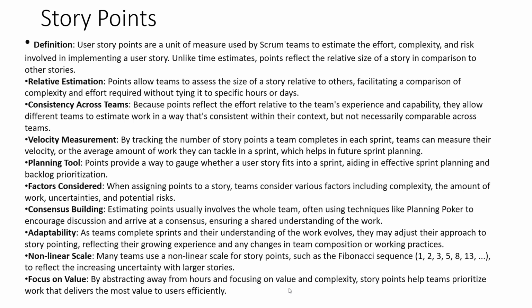And we don't want one person giving the estimates. We want the team as a whole to be able to understand what's going on and collectively give feedback on their experience and their capabilities and what they think it needs to actually get done. And when thinking about this, teams need to consider, as I mentioned, a number of different factors. But at the end, we need to go to a consensus on how many points we need to assign to this particular user story.